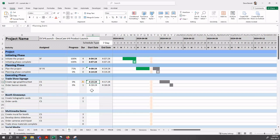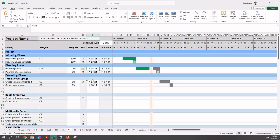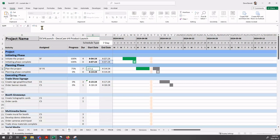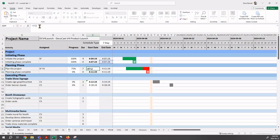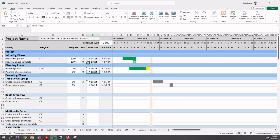You can also do other things. We've learned about leads and lags. For example, for here, this is equals F7 plus one. Let's say we want a lead. We want to overlap a little bit. Instead of plus one, we could say minus two. So to have a lead, to have it start a little bit early. And then you see what it does there. It went two days, actually three days early. A two day lead would look like that. Now it's a little bit confusing. Minus one is a two day lead. You just have to play with it a little bit.